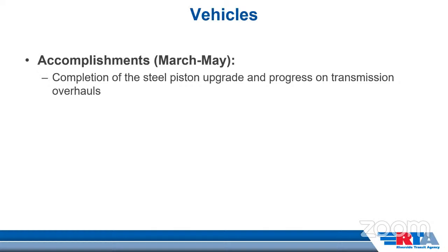We've completed about 20 of the 114. This will increase as more of the mileage begins to ramp up on the Gilligs. The board did opt for the more cost-effective overhauls as opposed to outright replacement.